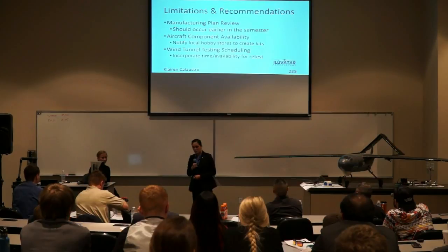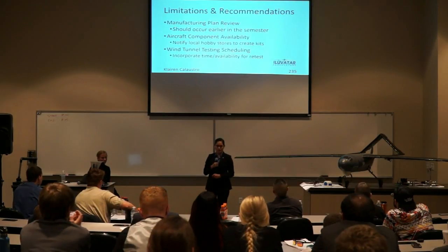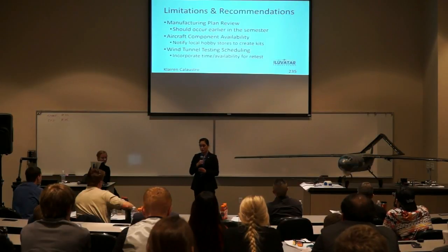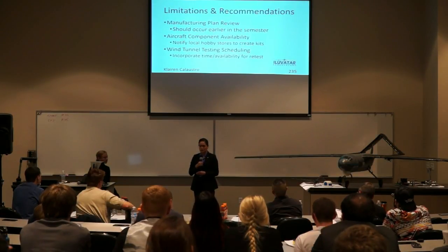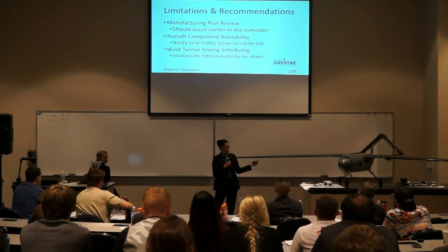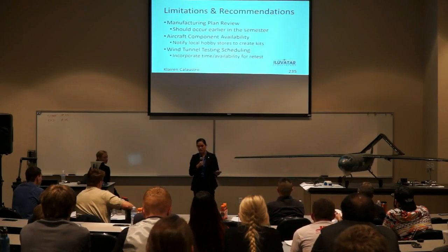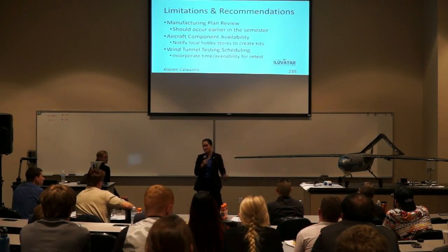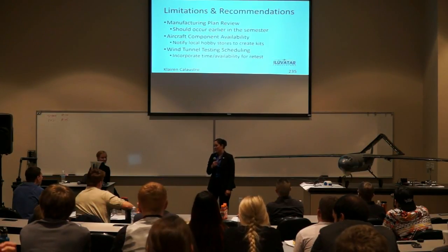Limitations and recommendations. The manufacturing plan, we had that reviewed during the semester, but we felt it would be more beneficial to have it earlier in the semester, and then we could look into the specifics of how things were going to go. We should have done our wiring or our connections differently, and that's why our cost was so high for electronics, because we had to keep purchasing more and more of these quick disconnects that Josh Day had mentioned were not so quick for disconnecting and reconnecting.